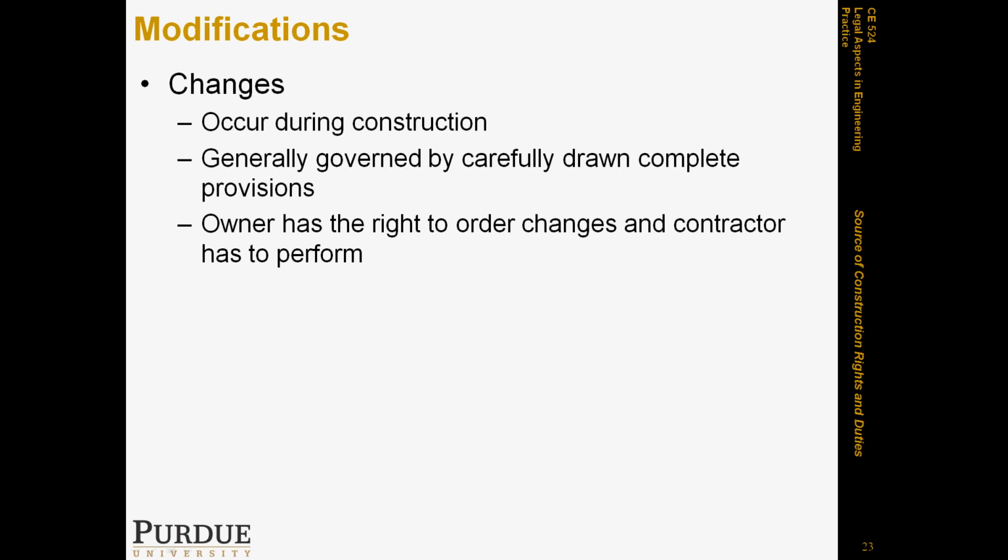However, the contractor has to comply and perform them, not for free. They would receive compensation for those changes, and usually there is appropriate language handling that in the general conditions of contract, and we'll study that, as I mentioned, in detail, I promise you.